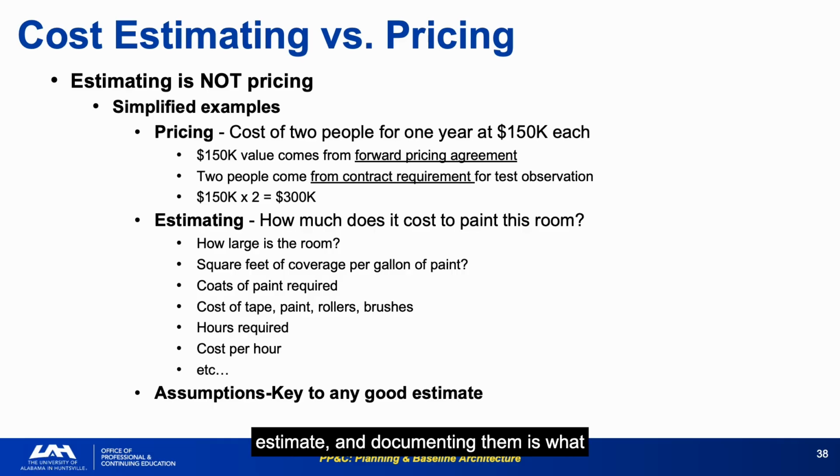Assumptions are the key to any good estimate, and documenting them is what separates an estimate that holds up a review from one that falls apart when the review board asks, "Why did you assume that?" The failure mode here is treating estimating like pricing, applying a rate to a quantity and calling it an estimate. That approach hides the actual cost drivers and produces a number that has no basis in the work content.